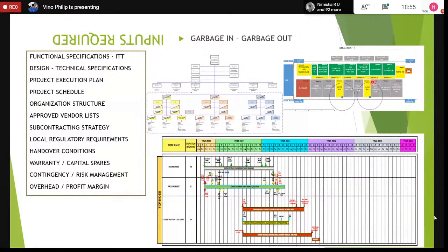So we are considering that all of these modules are fabricated in Brazil, but also we do the engineering in Brazil. So we have to send our engineering team to Brazil from MODEC Singapore, which is our execution center, to supervise them to do that according to our requirements. So we have to issue a request for quotation from Brazil for this.